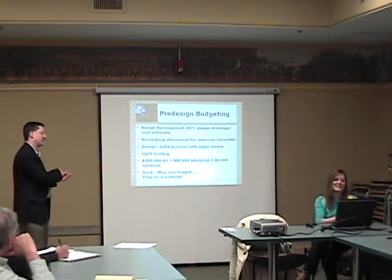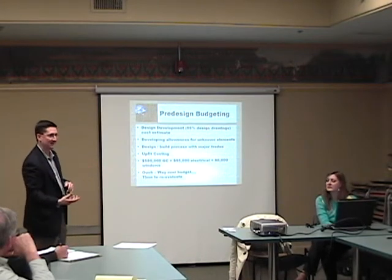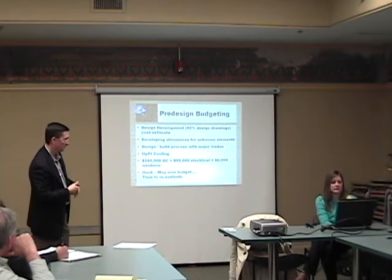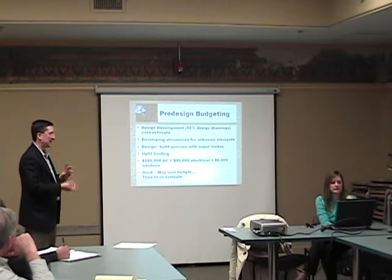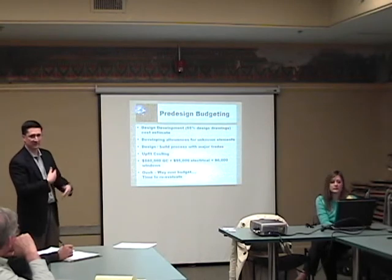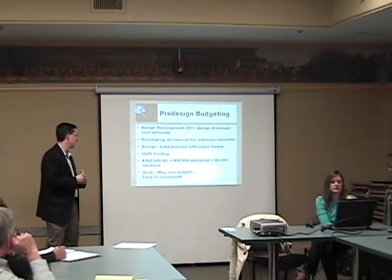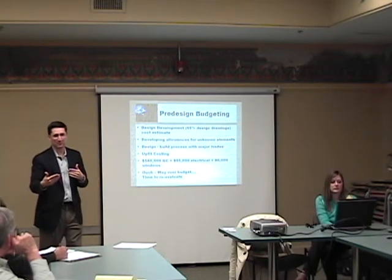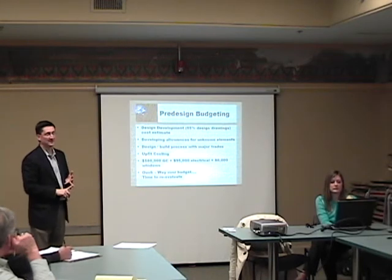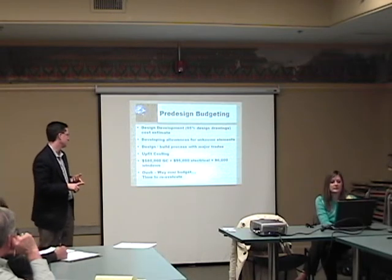Then we prepare a set of 65% kind of enhanced design development level drawings. We have some basic mechanical components, system design, electrical, we've located lights, outlets, data, developing some of the interior, which is going to be basic material finishes, not specific. So we developed some allowances for some unknown elements. Began the design build process with the major trades that I mentioned earlier. Upfit costing, now it's $580,000, it's $95,000 for electrical, and it's $80,000 for windows.